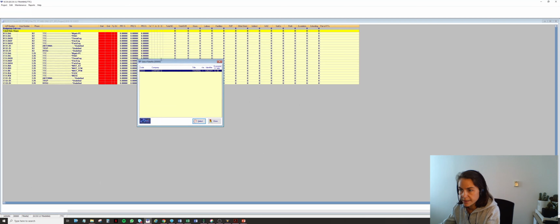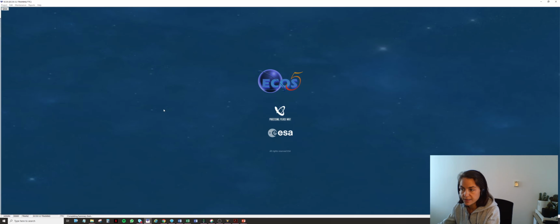So you see here, they ask you always to select a rate file. So you cannot go in the cost data entry mode if you did not first create a rate file. So in this case, at the beginning of the training, we restored some rate files already prepared for us. And in that case, we can select the rate file for the company D. This will allow you to perform your data entries.